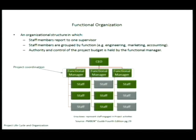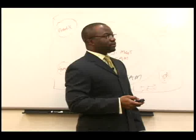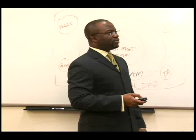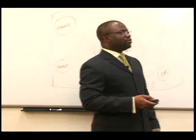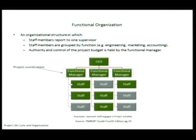In the functional organization, staff members report to one supervisor and are grouped by function — for example, engineering, marketing, and accounting. The authority over the project budget is held by the functional manager. The project manager's role is known as project coordinator or project expediter. The project manager has very little authority and is seen as someone who just coordinates the project. Ultimately, the real power lies with the functional manager.